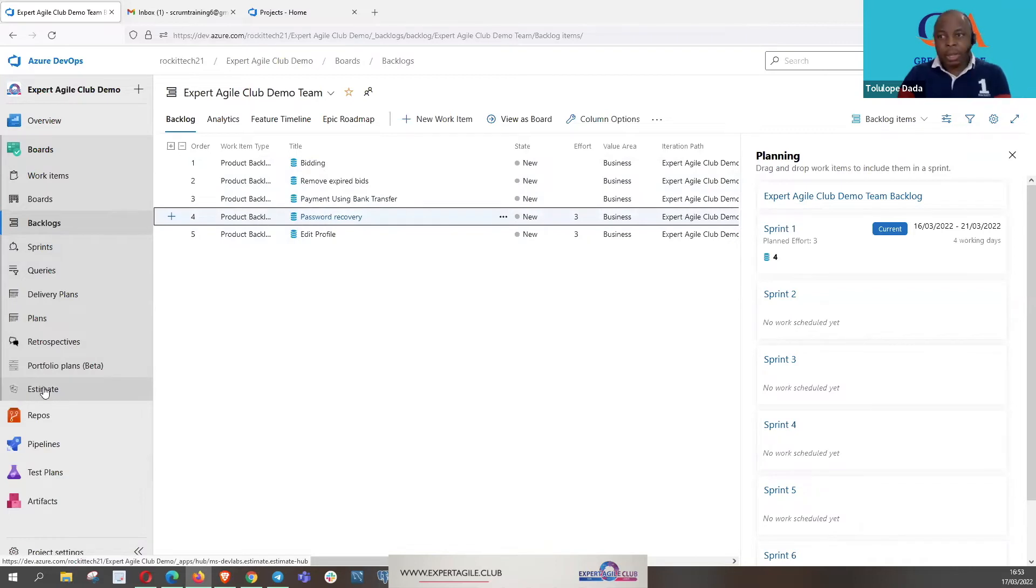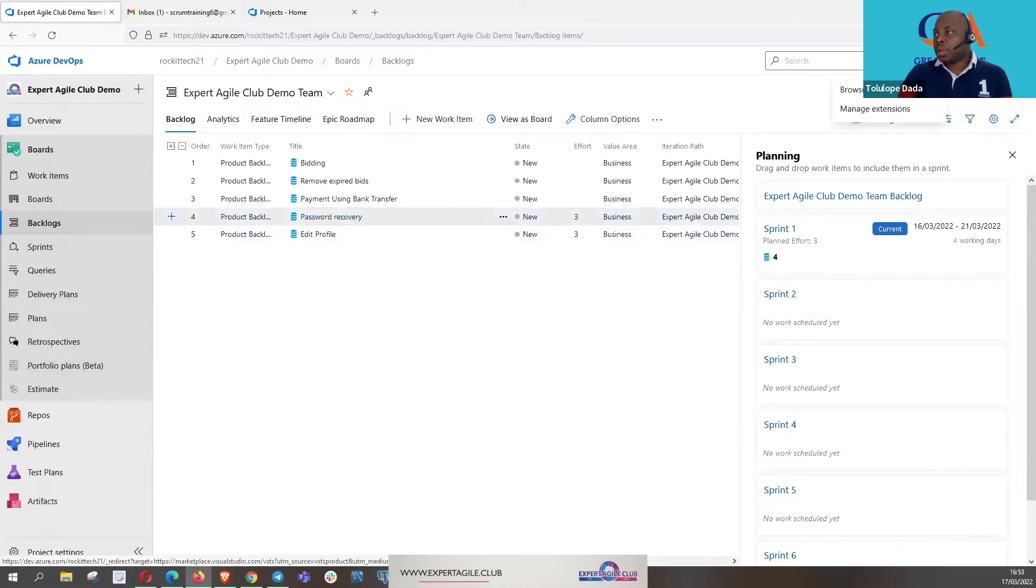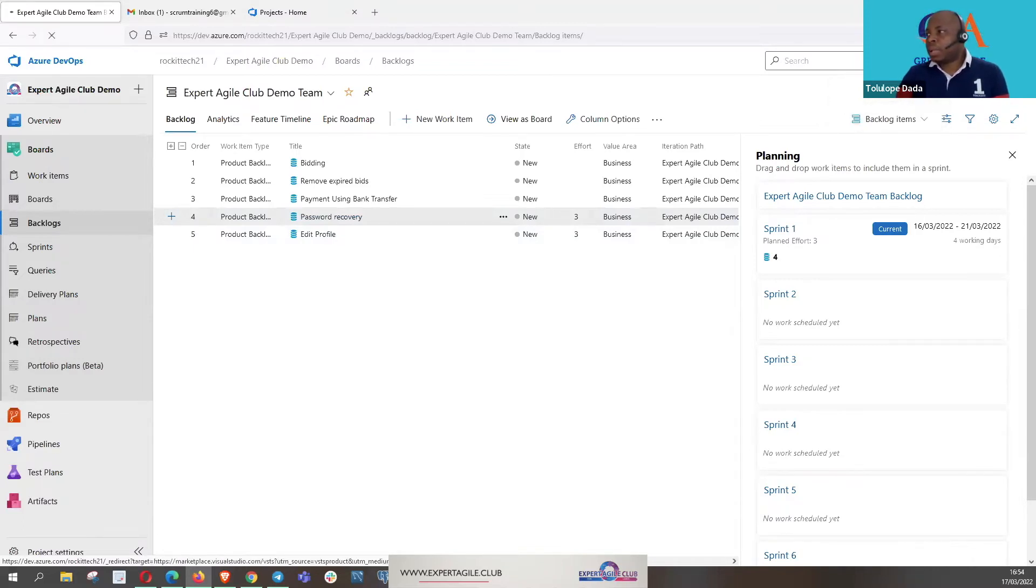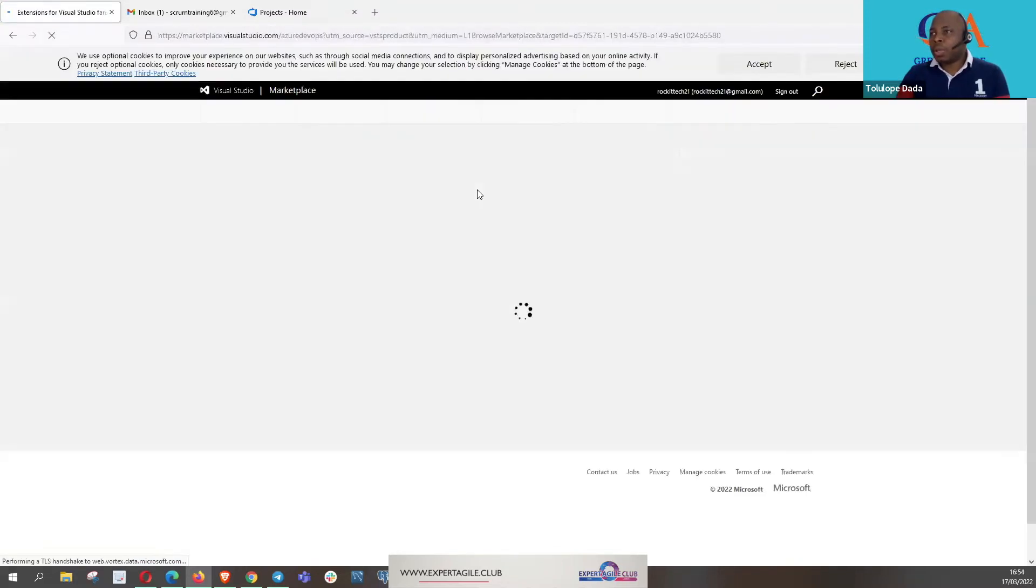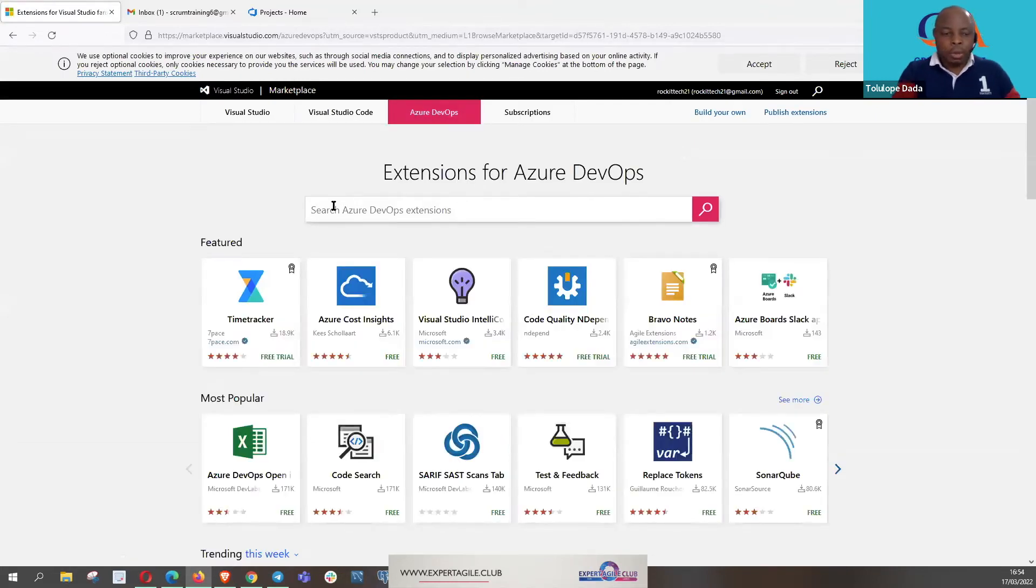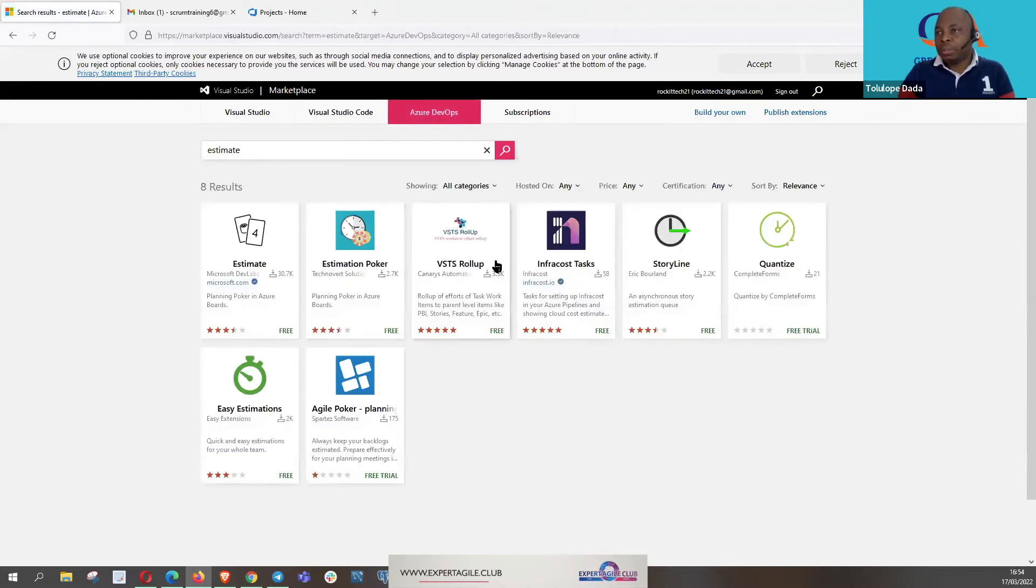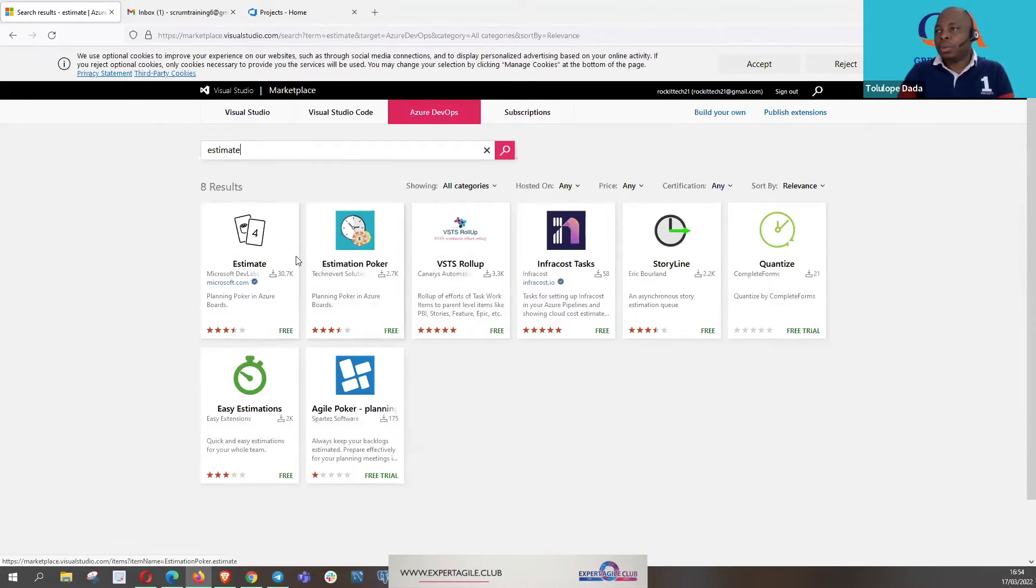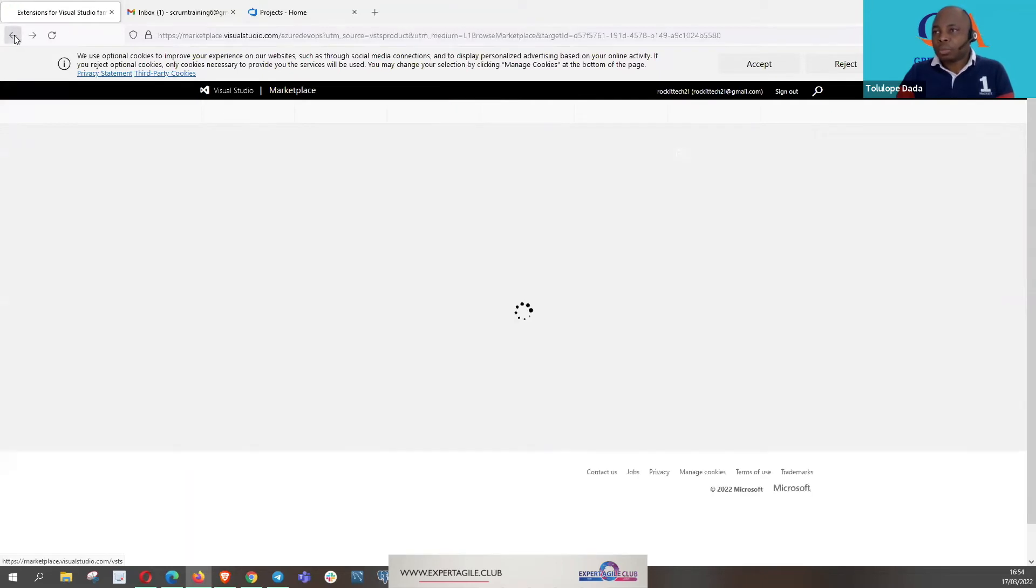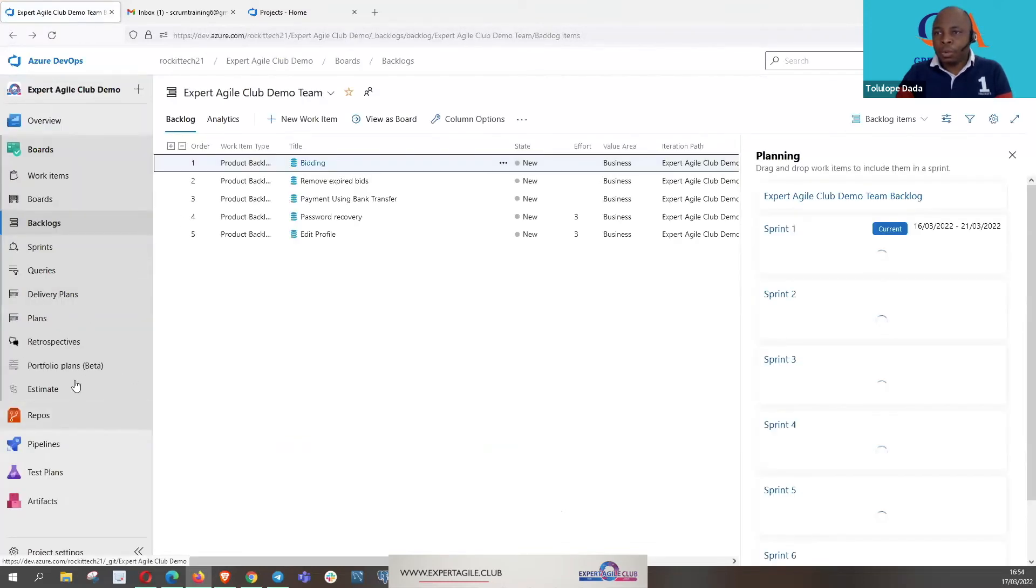When you've done that you now go to estimate. Once again, to get this estimate doesn't come readily with Azure DevOps. You need to go to what we call Azure marketplace. So just click on this bug-like icon and say browse marketplace. In the marketplace, if you know that you're looking for estimate, you type your estimate, and then various tools for estimation form. You click on the one that you want and then you install it and then you use it for your estimation.